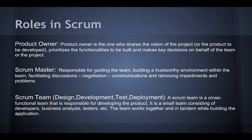Now let's talk about the different roles in Scrum and how they are defined. The easiest and most common way to mess up Scrum is to assign certain roles to certain people in an organization. For example, a manager should never be a scrum master. Let's divide these into the roles and understand what they should be responsible for. Product Owner: the one who shares the vision of the product, prioritizes the features to be built, and makes key decisions on behalf of the team or the project. The Scrum Master is responsible for guiding the team, building a trustworthy environment, facilitating decisions, negotiating, communicating, and removing impediments and problems. The Scrum team is a cross-functional team responsible for developing the product — a small team consisting of developers, business analysts, testers, etc. — that works together in tandem while building the application.